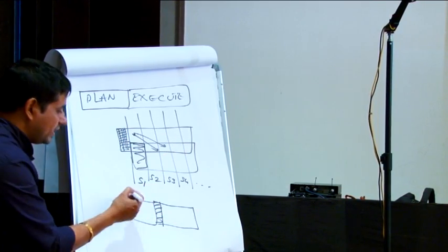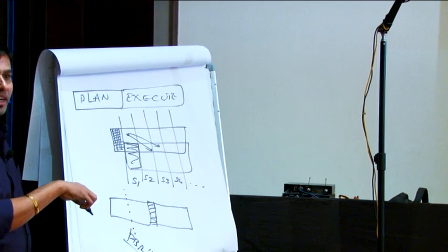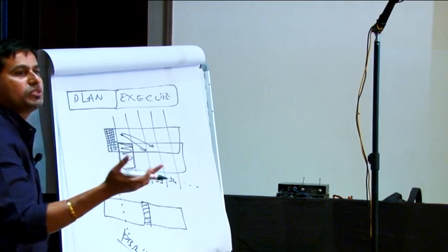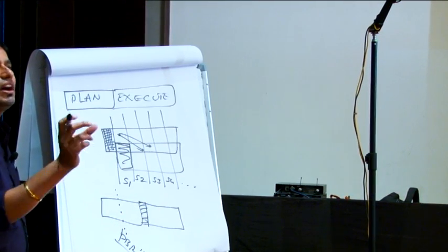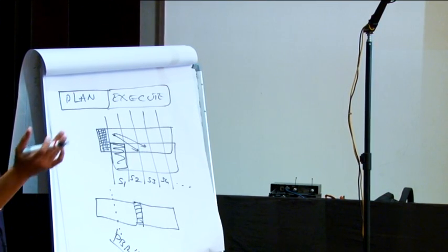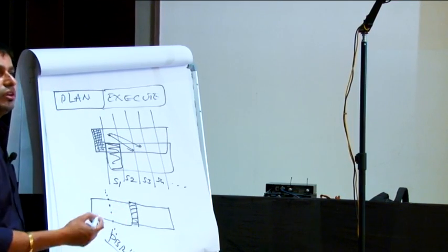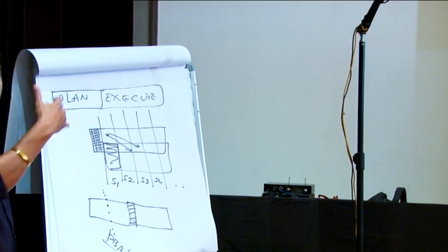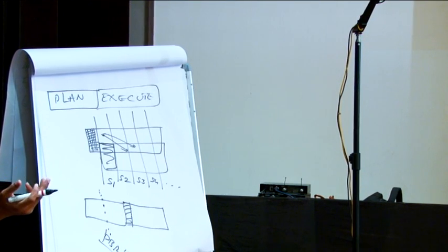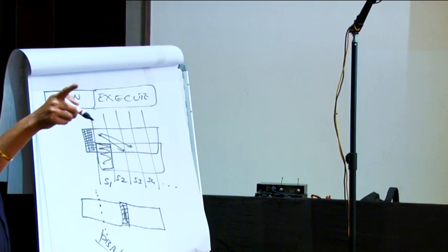So in order to avoid that, you will have product backlog refinement, which is not an official event of Scrum; it is called an activity. There is no hard and fast rule that you should do it in the middle of the sprint. It is up to you. Some teams spend half an hour every day. What the Scrum Guide suggests is not more than 10% of the capacity of the sprint should be spent on product backlog refinement. Here you discuss the items, split items, estimate, create your acceptance test criteria, and create user interfaces, whatever is required, so that by the time you come here, items are readily available, which matches the sustainable pace principle number 8.